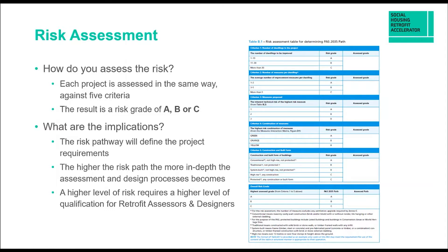There are some interesting things you can do in terms of the risk profile, but it's really important when scoping your projects to understand the implications of the risk pathways. The risk pathway essentially defines the project requirements — your monitoring and evaluation requirements, any air tightness testing needed, and the inherent risk of the project. The higher the risk pathway, the more in-depth the assessment and design process becomes. Working to pathway A carries fewer requirements for the designer and specification than a pathway C project, and higher-risk pathways B and C require higher qualifications for your retrofit assessors and retrofit designers.